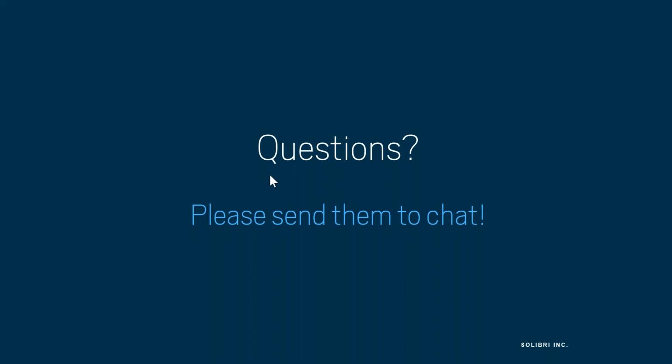Okay, then there's a question for you guys as well. You mentioned 3D model is not always the best solution. Can you give scenario examples? Yeah, okay. So I think in that context, I was thinking about deliverables for the client organization to use. When most of us, myself included, think about a BIM process, sometimes we default and think about models, because models are an intrinsic part of a BIM process, but aren't necessarily the best or most useful deliverable for a client at the end of the project if the client doesn't have the capabilities or the tools to use or view those models.